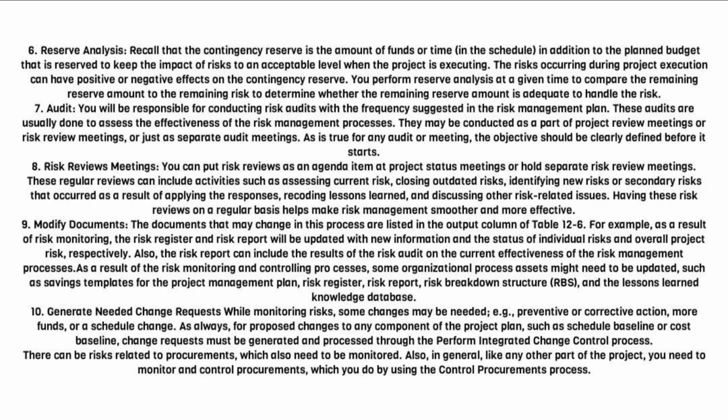6. Reserve analysis. Recall that the contingency reserve is the amount of funds or time in the schedule, in addition to the planned budget, that is reserved to keep the impact of risks to an acceptable level when the project is executing. The risks occurring during project execution can have positive or negative effects on the contingency reserve. You perform reserve analysis at a given time to compare the remaining reserve amount to the remaining risk to determine whether the remaining reserve amount is adequate to handle the risk.